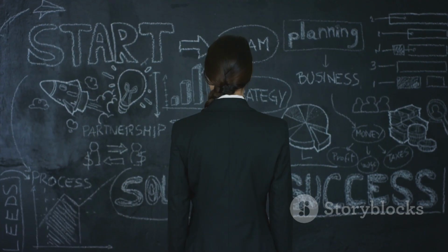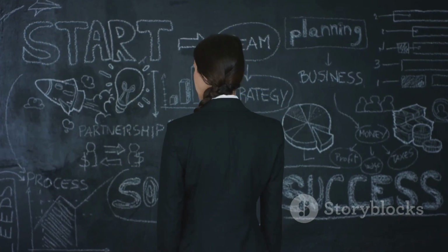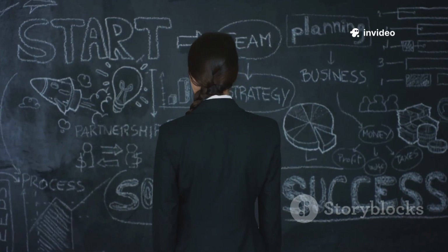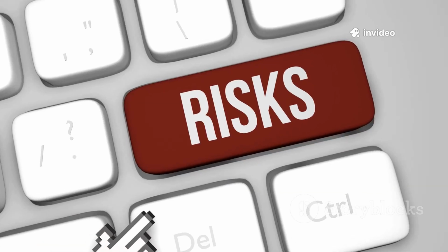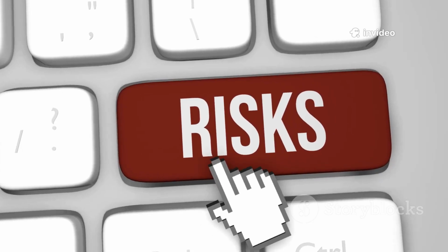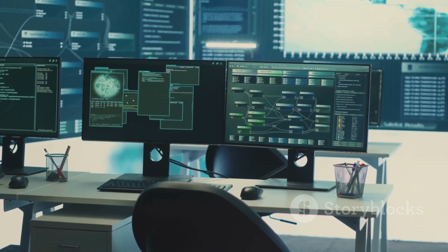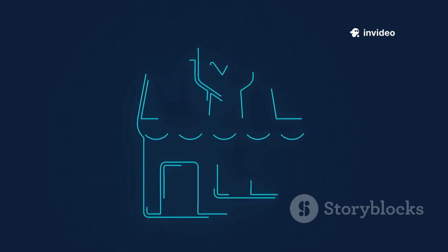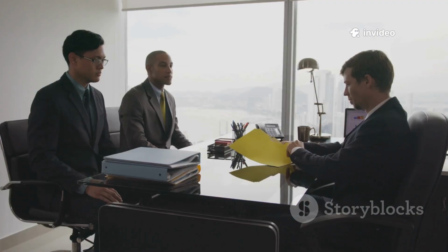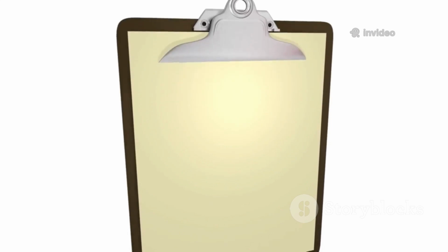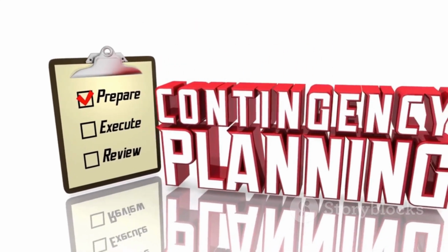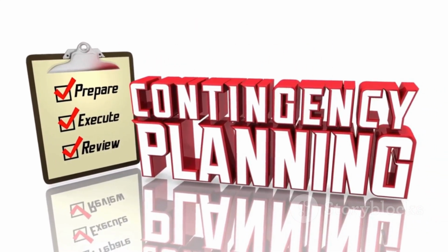Now, risk management isn't a one-size-fits-all situation. I tend to break things down into different approaches. First, there are some risks I can totally avoid, like just not using a system that's known to be risky. Then there are risks I can reduce, maybe by improving technology or adding stricter controls. Some risks I can transfer, like taking out insurance. And finally, there are those risks I just have to accept, but I make sure to have a solid plan B, like backups or a recovery plan, just in case.